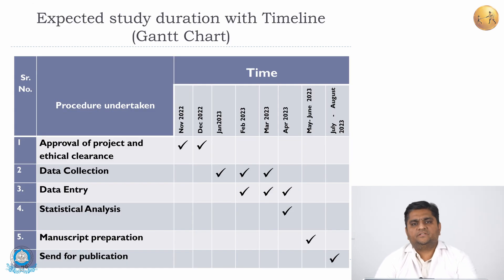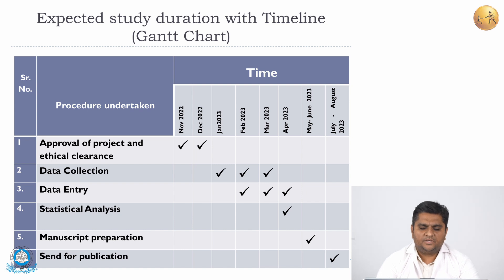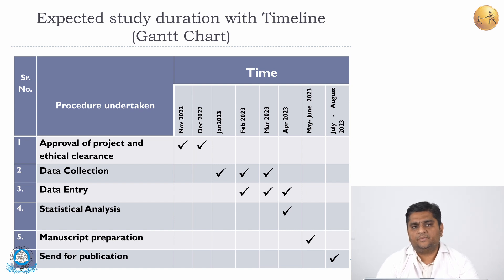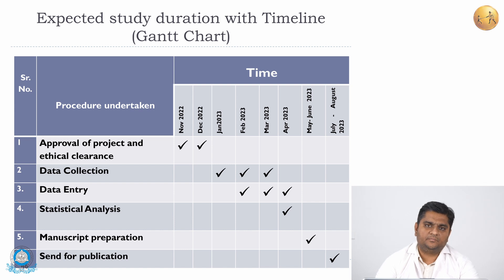You need to mention the Gantt chart or expected study duration with the timeline. Plan out when you will start, from obtaining the approval, to the data collection period, data entry time, statistical analysis period, manuscript preparation time, and finally when it will be sent for publication. This entire plan has to be ready before you start the study.